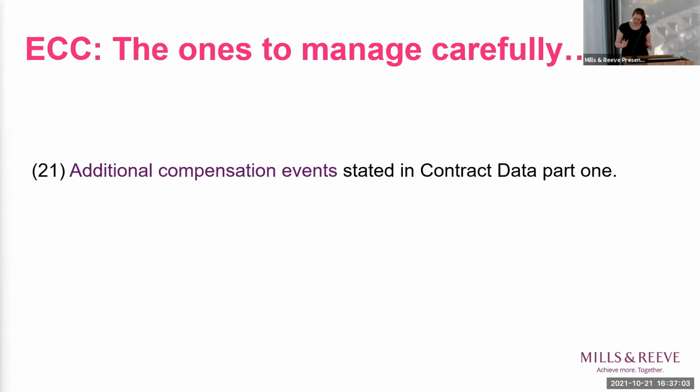As we've said, there's a lot of documents in an NEC contract, and one of them is a project risk register. And we would say, don't attach this to the contract. Don't risk inadvertently giving CE events away that you don't want to as a client, or accepting risk as a contractor.